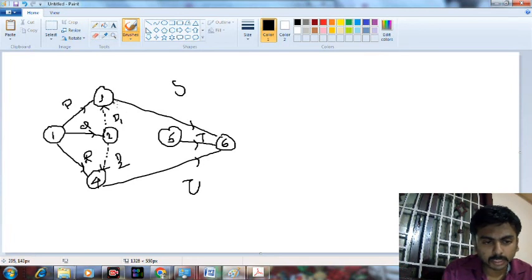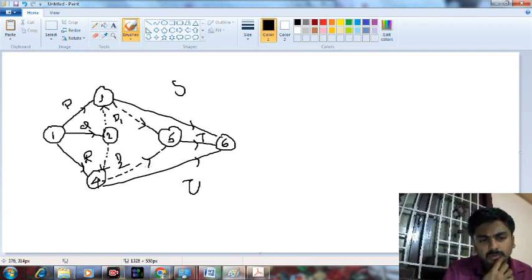So I once again have to draw the arrow diagram. The arrow diagram should always connect in the ascending order of numbers.